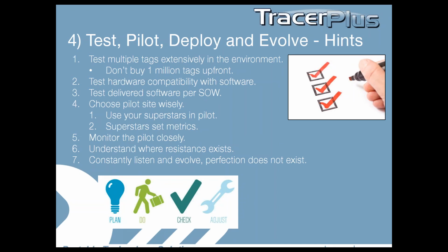Make sure you test the software and it does what it's supposed to do before you put it in pilot. So many problems can be avoided by doing that simple testing. Maybe it's 20 hours of testing that will catch little things or things that were overlooked because we're using this new technology that's very different than a barcode or a piece of paper that you've been using, by just picking up the technology and using it. It sounds basic, but again, we'll underline that one for you.